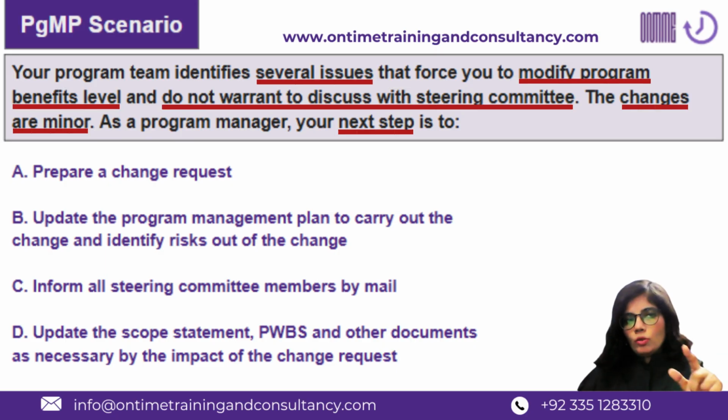Now, knowing this process, I told you a 7-step process. Again, A, issue the change request, B, impact analysis, C, approval, D, updating the different artifacts, E, communication of that change to the relevant stakeholders, F, updating the change log, and G, managing the change and tracking the change, which is a throughout exercise depending on the nature of the change, right?